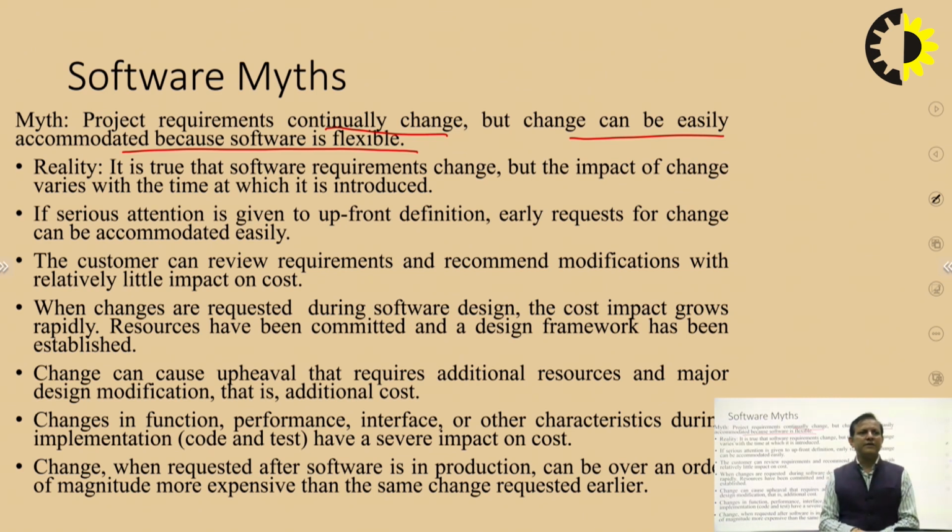The customer can review requirements and recommend modifications with relatively little impact on the cost. When changes are requested during the software design, the cost impact grows rapidly. Resources have been committed and a design framework has been established.